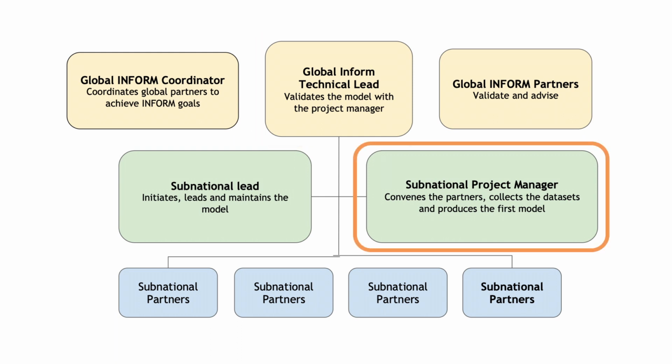The Project Manager works with the subnational lead to convene the partners, collect the dataset, and build the first model. This includes preparation and background work, consultation with the key partners, running a workshop, centralizing data, and collaborating with the technical lead to build the first model.